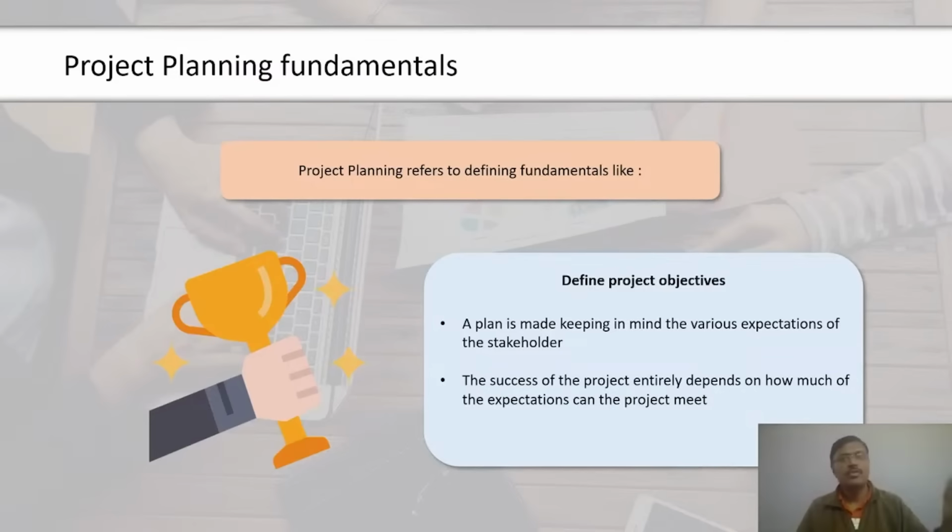Scenario analysis is about trying to vary a certain parameter to observe the impact on the schedule. For instance, you may want to check the result if you put more resources on a particular activity to reduce its duration. Resource optimization techniques try to arrive at the optimal utilization of the resources used on a project. Ideally, you would want resources to be fully utilized, but you would also want to build in sufficient buffers in case a certain resource is not available due to various reasons. In the next screen, let's look at the program evaluation and review technique.